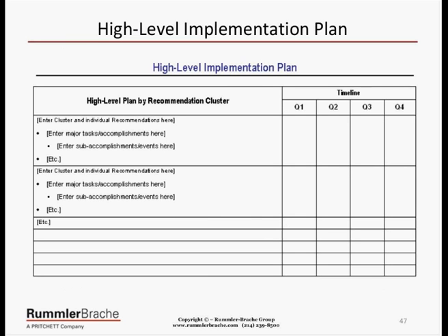Okay, and finally, of course, you'd have an implementation plan. Again, you're not a project manager doing the phase 1 and phase 2 of the PIP. What you're doing is describing at a high level the major changes or recommendations, the overall sequence of events, and a level of effort estimate on the budget and the timing.